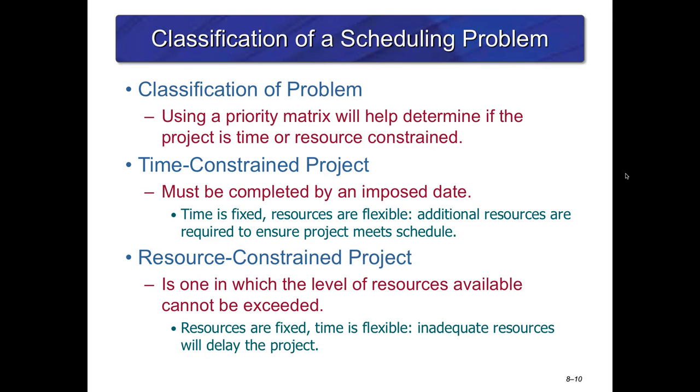Now, let's take a look at the next one. This is when we look at resource constrained projects. This is when the resources are fixed, but the time is flexible. And so we end up with inadequate resources, and inadequate resources certainly delay the project. I just had a roof put on my house last week. Wonderful roof, great roof, best roof ever. But if they didn't have the shingles, it doesn't matter what time they get there. You can get there at 7:30, you can get started, and there's no shingles. You're not going to be able to work. You might as well leave and go somewhere else.